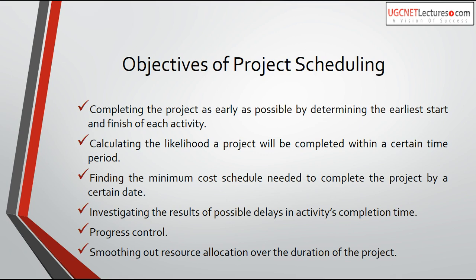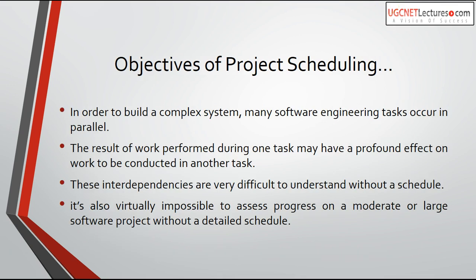Another objective is smoothing out resource allocation and duration of the project. With scheduling, you can also schedule resources — at what time, what resources should be given to which person or which activity. In complex systems, many software engineering tasks can occur in parallel. The result of work in one task may have a profound effect on work in another task. For example, if you change the design of a module, you also have to change the coding. So some activities are dependent on each other.